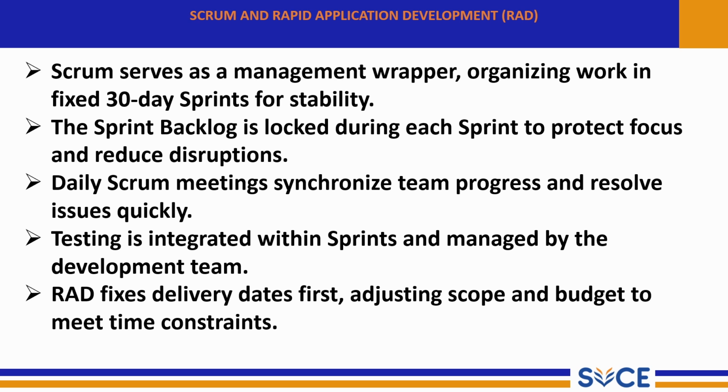The daily Scrum is a short stand-up meeting held every day, usually for 15 minutes. Team members share what they did yesterday, what they will do today, and any blockers they face. This keeps everyone synchronized and helps solve problems early.